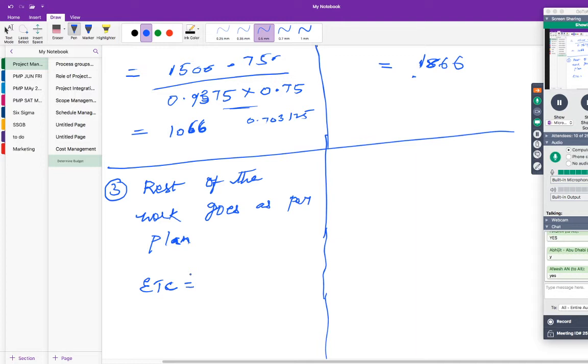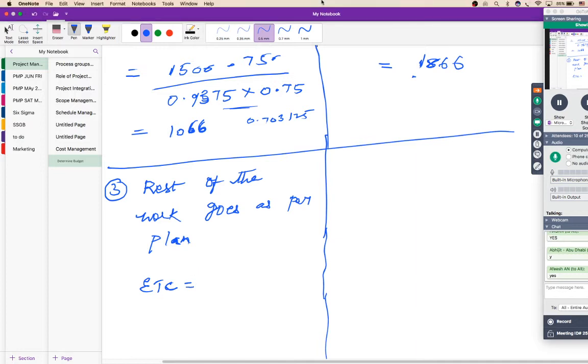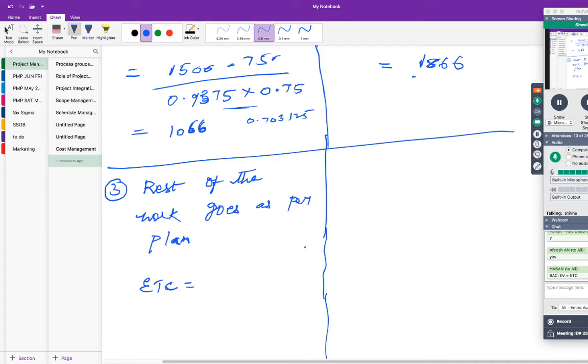I'll give you 2 minutes. BAC minus EV is equal to ETC. Yes, that's right, Hassan. What is our assumption?